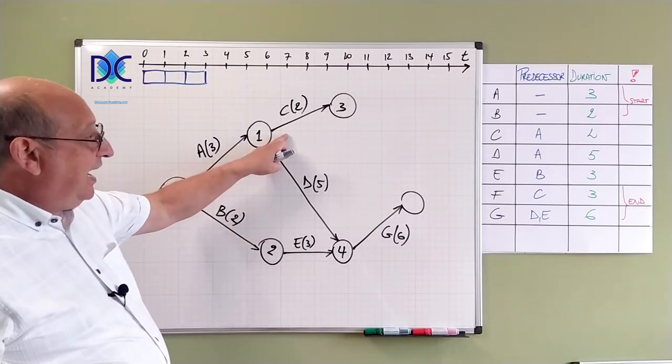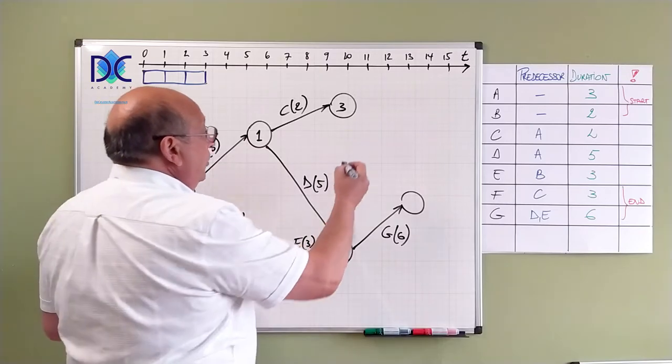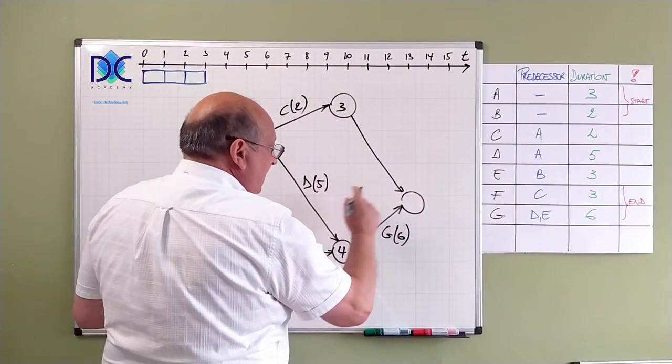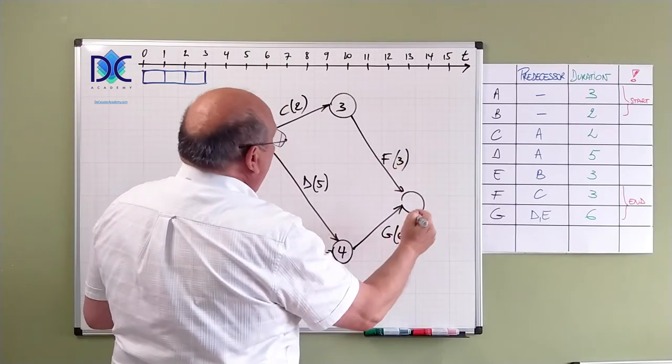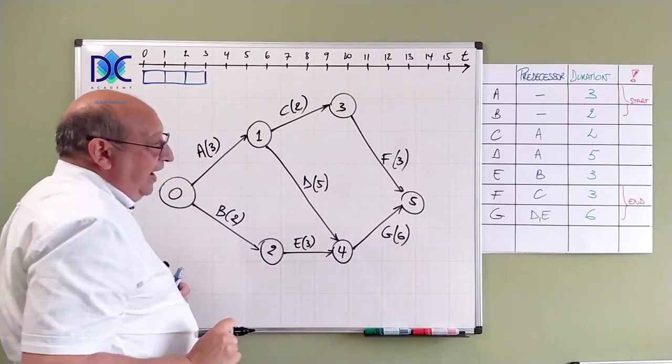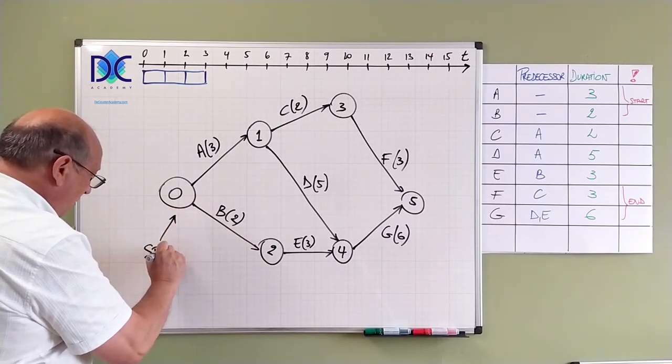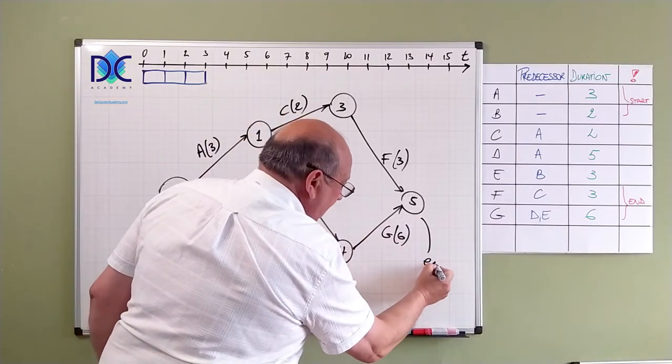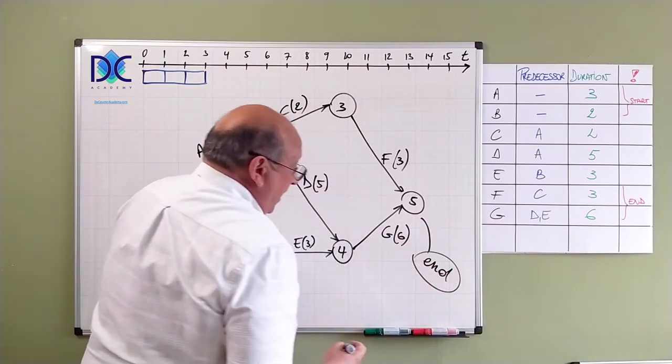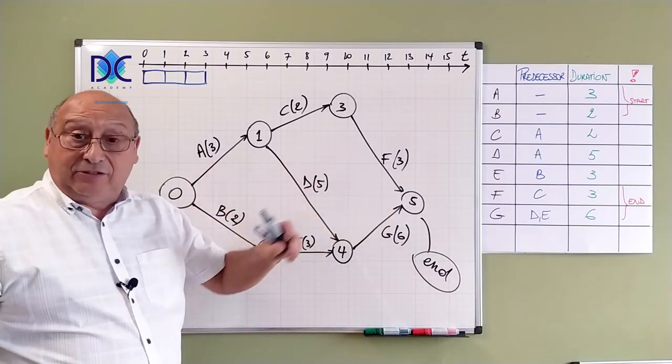Now we also have C. After C we have F. And F is also an end activity. So we have activity F with a duration of three. And the final note is five. So this is the start note. And this is the end note. And we see F and G end in that end note.